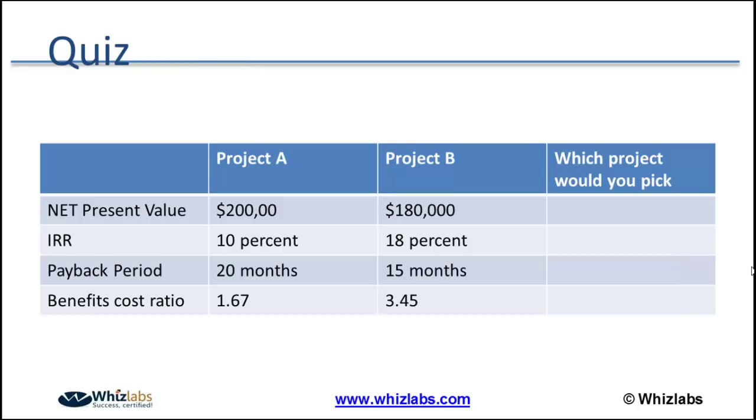The company may have initially declared a payback period, wanting the return in 6 months. But after planning the project, if the project manager identifies that this project will not be able to meet the initial cost or the initial objectives, he should immediately go to the selection committee and say that this project will not be able to achieve that strategic objective or the cost objective. That's what a project manager has to understand.